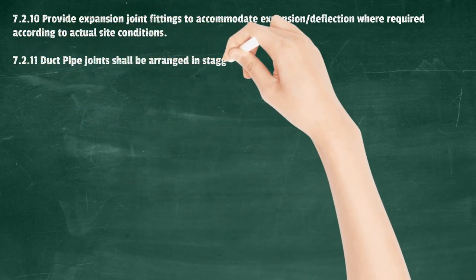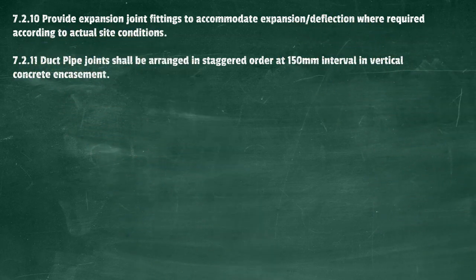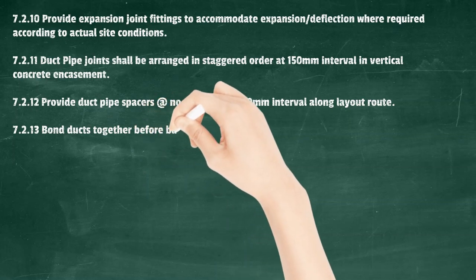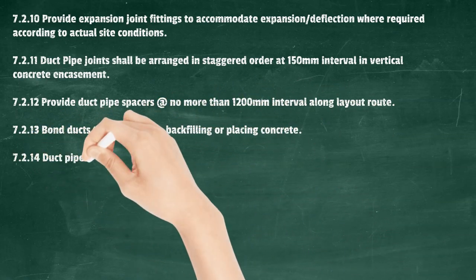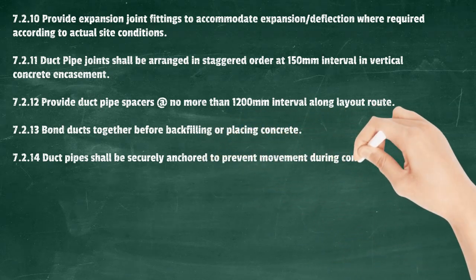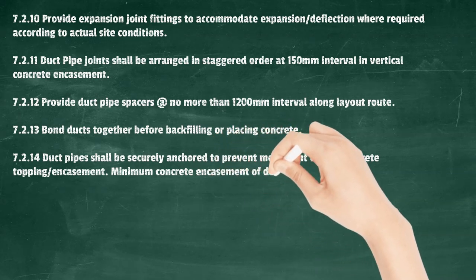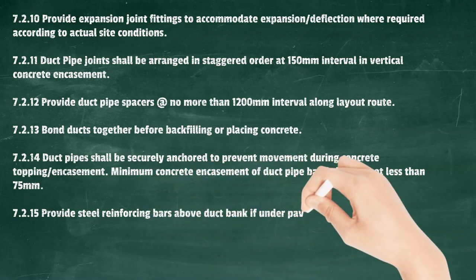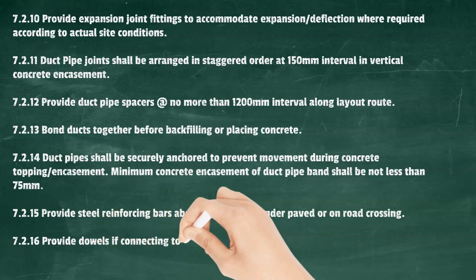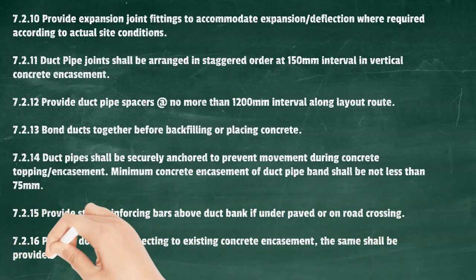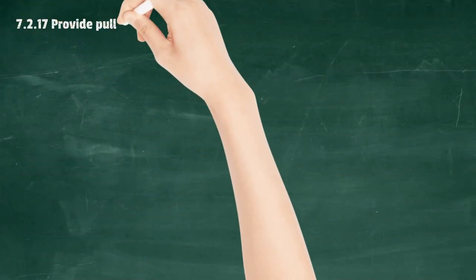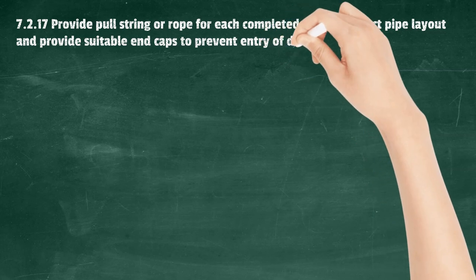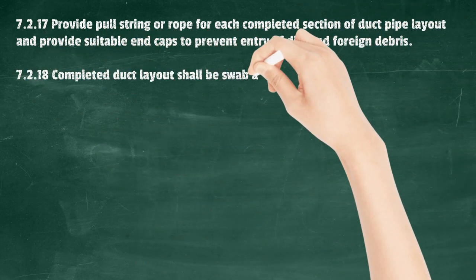Provide expansion joint fittings to accommodate expansion/deflection where required. Duct pipe joints shall be arranged in staggered order at 150 mm intervals in vertical concrete encasement. Provide duct pipe spacers at no more than 1200 mm intervals along the layout route. Band ducts together before backfilling or placing concrete. Duct pipes shall be securely anchored to prevent movement during concrete topping/encasement. Minimum concrete encasement of duct pipe band shall be not less than 75 mm. Provide steel reinforcing bars above duct bank if under paved area or road crossing. Provide dowels if connecting to existing concrete encasement or to the wall of a manhole. Provide pull string or rope for each completed section of duct pipe layout and provide suitable end caps to prevent entry of dirt and foreign debris. Completed duct layout shall be swab and mandrel tested to ensure smooth cable pulling.